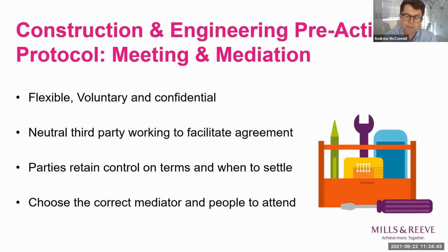And just a final tip is having a hard copy draft settlement agreement ready to go on the day, because there's nothing more frustrating than reaching a settlement but then having to spend quite a few stressful hours at the end of a long day scrambling around trying to get a settlement agreement together. So that's something to be avoided with a bit of preparation, I suppose.